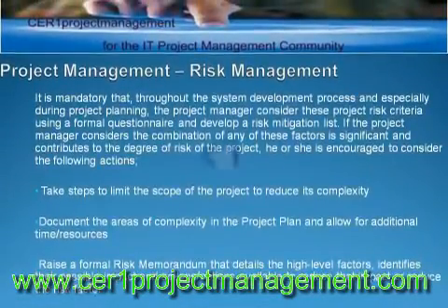Take steps to limit the scope of the project to reduce its complexity. Document the areas of complexity in the project plan and allow for additional time-bound resources. Raise a formal risk memorandum that details the high-level factors, identifies their possible impact and actions available to reduce that impact or reduce the risk factor.